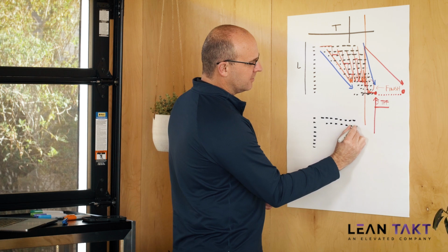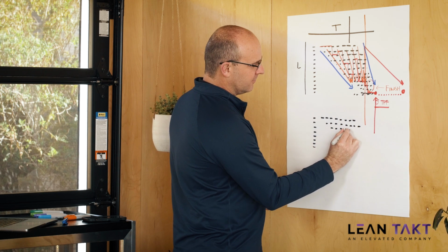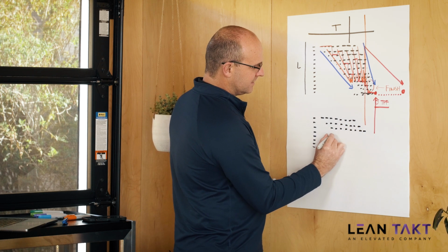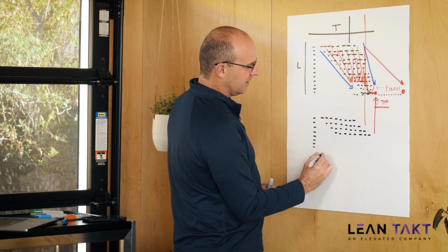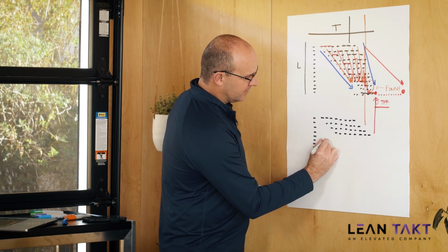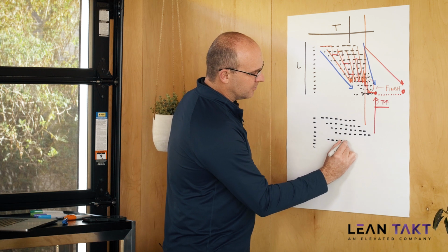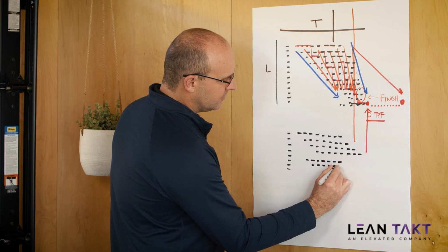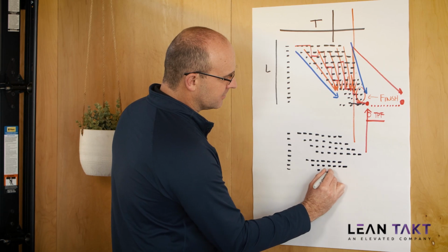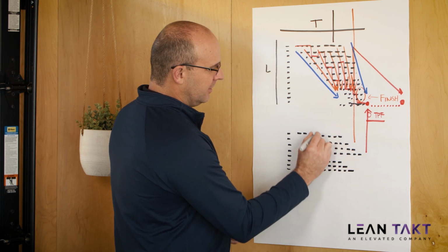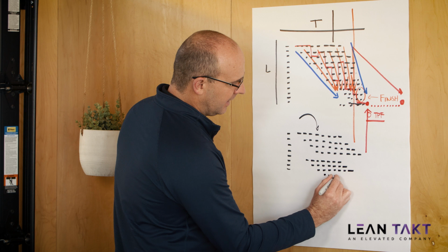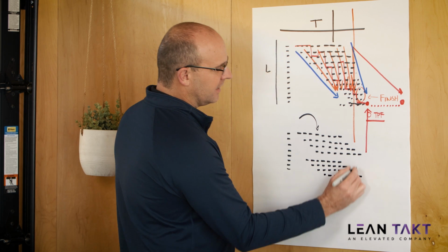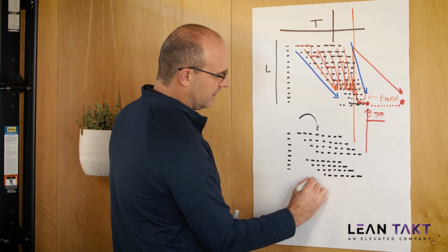Where you have really good diagonal trade flow, what would it take to finish this building and still hit on time? And what we found out was we would have to switch one portion of the building and basically split the crews in half and say, hey, this one set of crews will work in this area, and the other crews broken out will work in the other area.